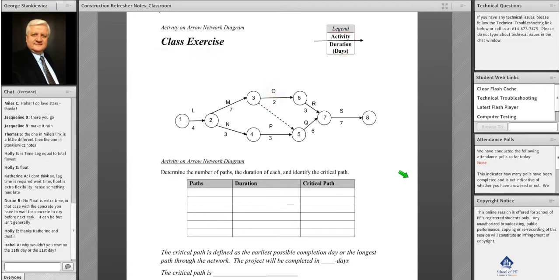The first thing you have to do whenever you look at a project schedule is determine how many paths there are, the duration of each path, and the critical path. The critical path is the longest path in the network or the earliest date that the project can finish.